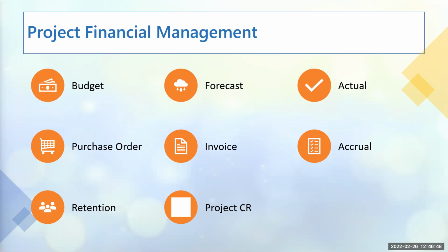And you need to capture the date to say, okay, retention was sent for this month. This is the percentage of retention that was sent in value. This is how much it is costing. And at the end of each milestone, could be at the end of every 3 months, we get our retention value back, plus our invoice value.